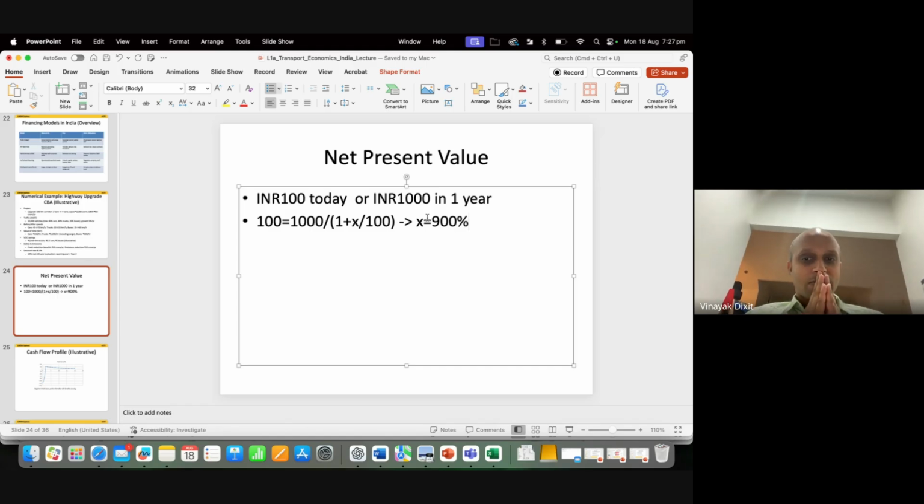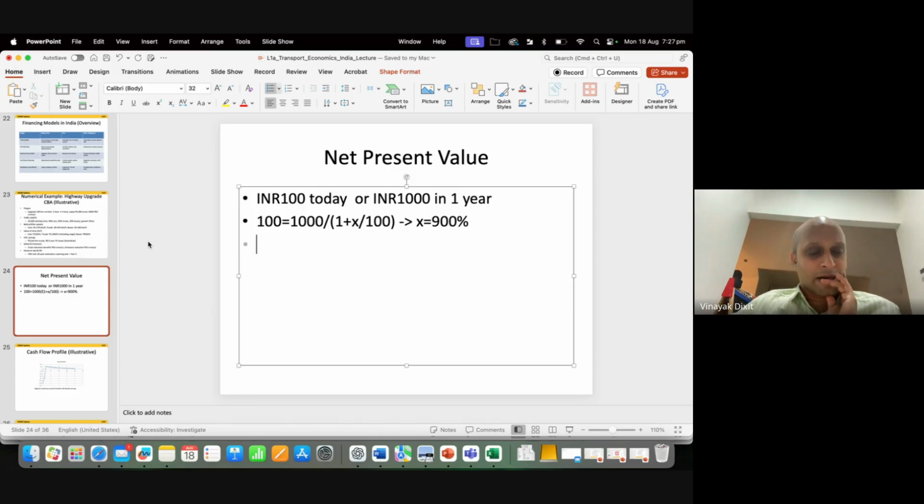Am I making sense? This is what a discount rate means. So 100 rupees tomorrow is not worth 100 rupees today. 100 rupees tomorrow would mean probably 50 rupees for you today. Got it? So this is how you do discounting. What I am telling you right now is based on interest rates, and there are a lot of factors that affect the discounting rate which we use. It depends on interest rates, bond rates, and the fiscal and monetary policies of a country.